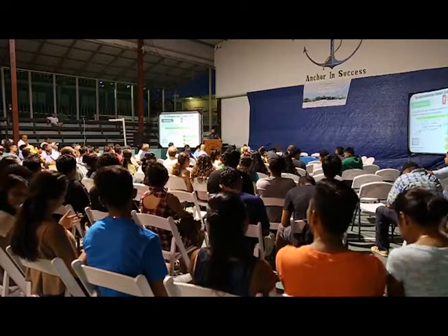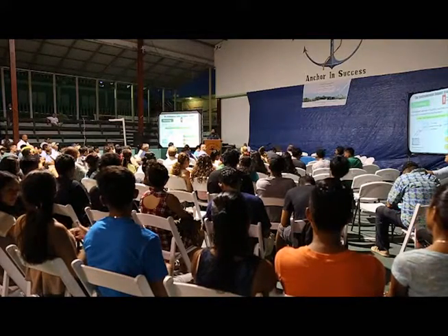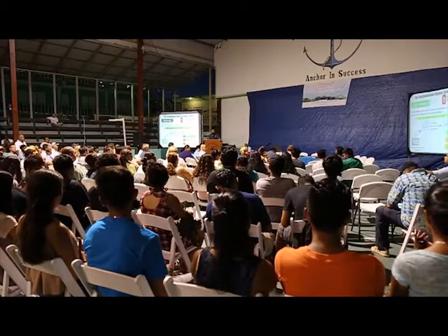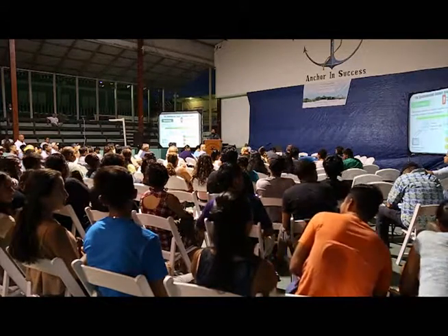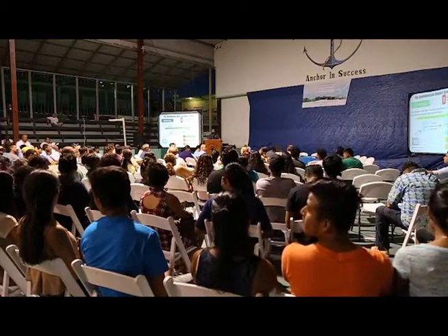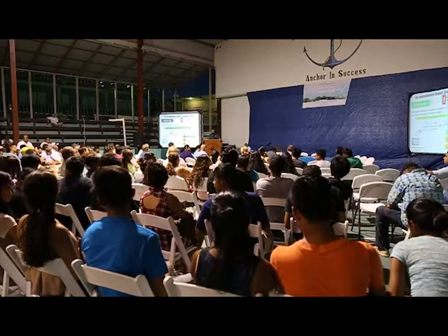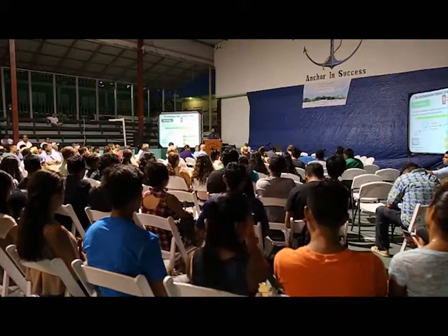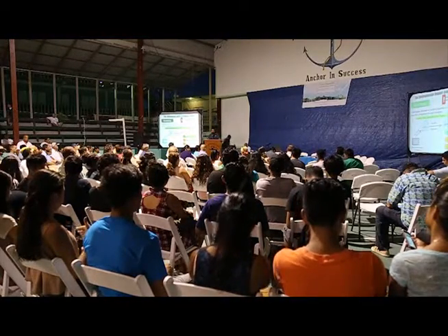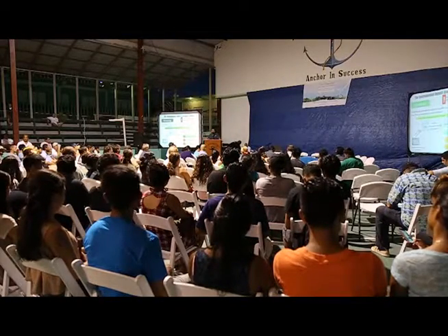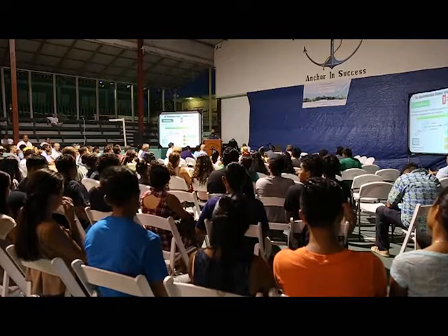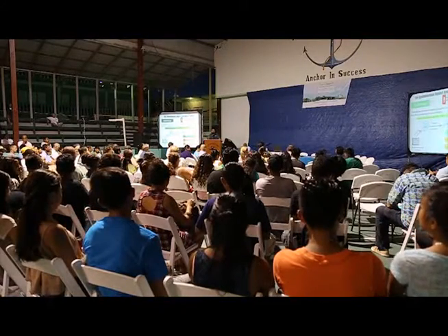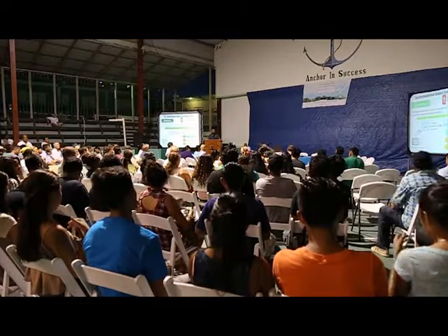I take a pause here to educate a little bit more, because I know in our audience we have some students who would like to know more about the environmental impact assessment process, or let me call it the environmental clearance process, of which the EIA process is only part of. So in the environmental clearance process, when an environmental impact assessment is not required, it does not mean that studies are not required for us to make a decision. It just may be that there is information that is needed to make a sound decision, and based on the thematic issues that need to be addressed, it just may be that such a development will require a limited level environmental study.